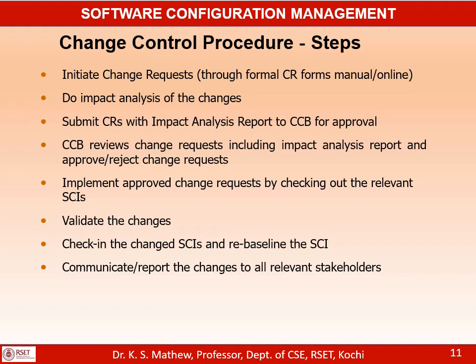The configuration manager in charge will submit the change request along with the impact analysis report to the CCB for approval. The CCB analyzes the change request, including the impact analysis report, and takes a decision on approving or rejecting the change request.